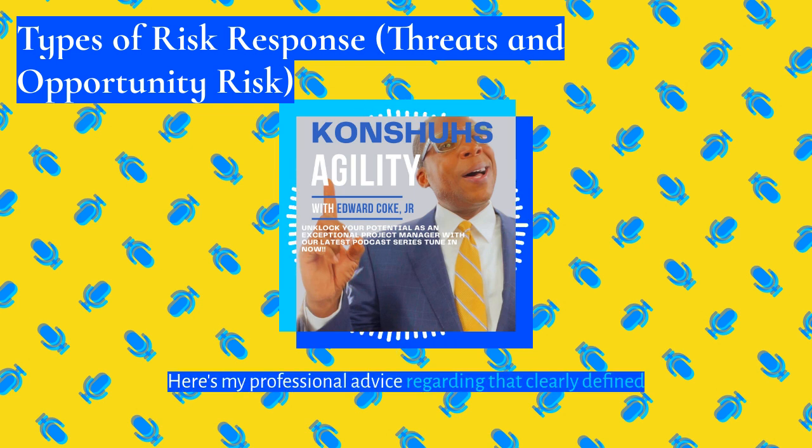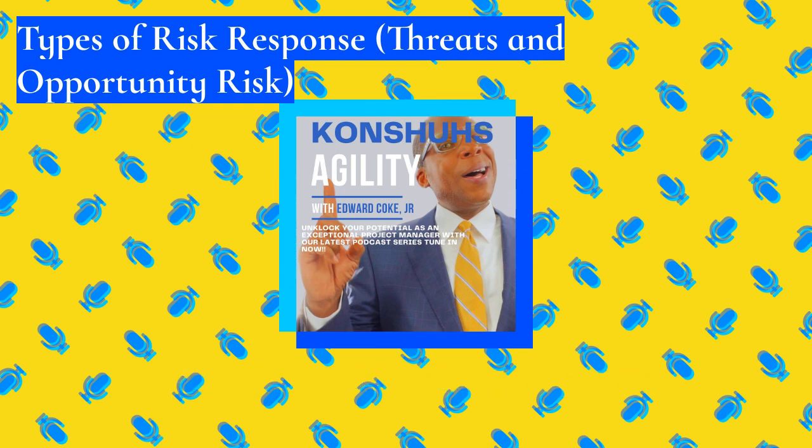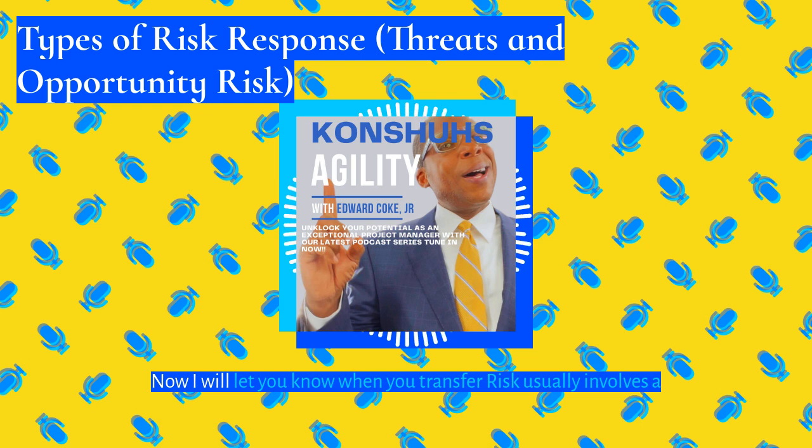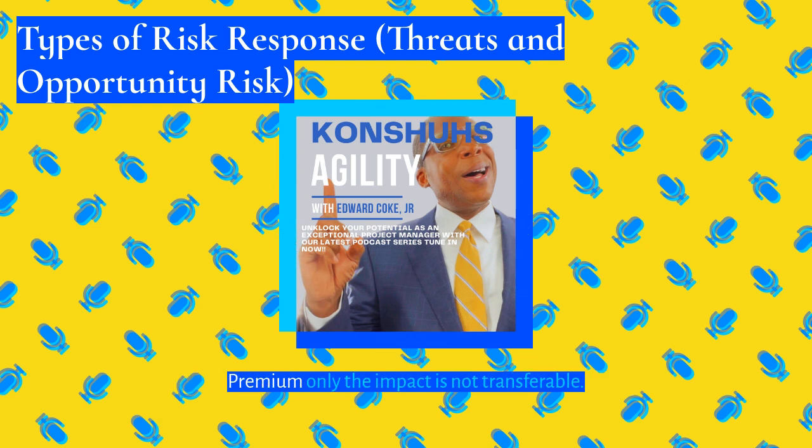Here's my professional advice regarding that. Clearly define transfer risk terms in contract. This risk response works best for financial or legal risk that can be managed by specialized external resources. Now, I will let you know when you transfer risk, it usually involves a premium. Only the impact is transferable, not the responsibility for managing the relationship. Again, only the impact is transferable, not the responsibility for managing the relationship.